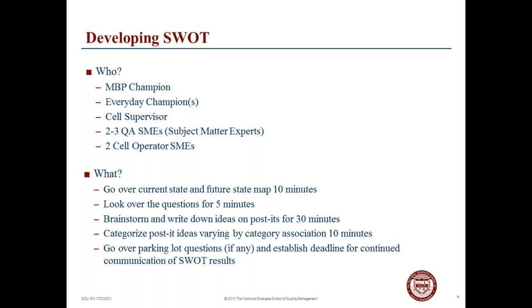So to answer Matthew's question, a parking lot is, we usually have this big board that we'll bring into the meeting. And if there's a question that we can't answer during our meeting, we put it in the parking lot. So we'll write the question on this board, and we'll assign someone to get an answer as soon as possible. And then those answers are sent out to the rest of the people in the group. So I'll text that to Matthew in a little bit. But that essentially is the parking lot questions. Again, it's just side questions that we don't have a direct answer to at the moment of the meeting. But we will do our best to get an answer and communicate it back out to the whole group so that everybody's aware or has an idea of what the answer to the question would be.